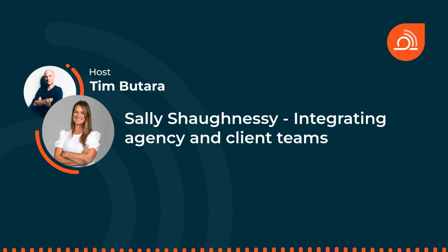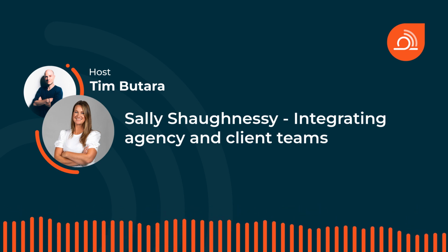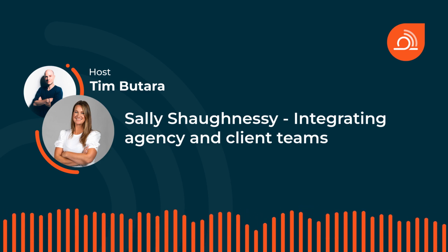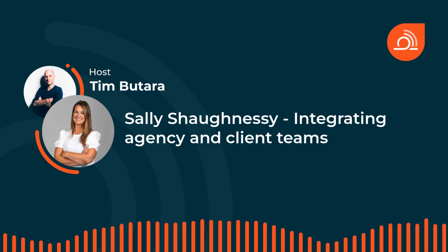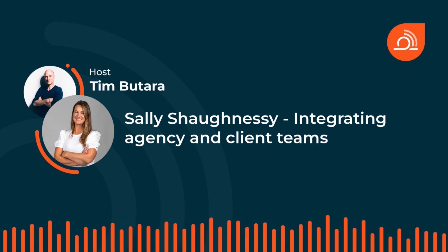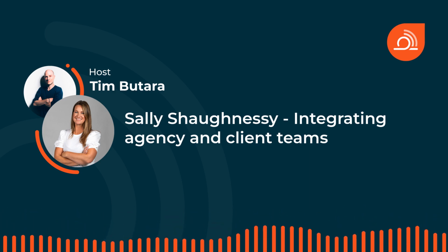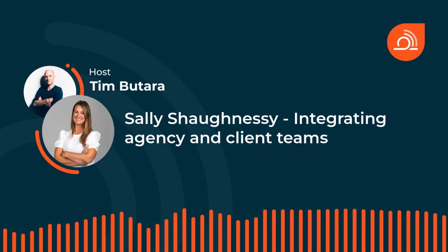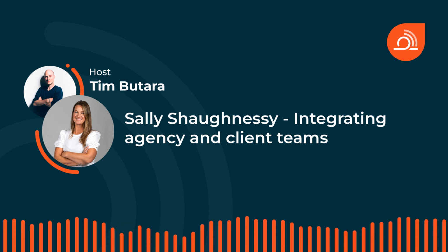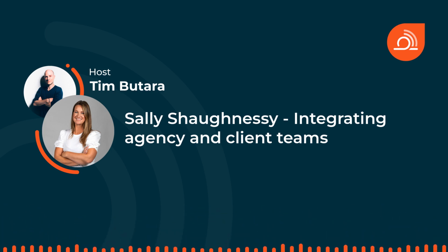Before you engage your partner, organize yourselves internally. Do you have the right steering committee or core team ready and allocated to take on this project? Sometimes the procurement team is ready to start a project, but the people that need to actually participate in the project were never made aware that this project was landing on their desk. And so that's another tip too, is that if the procurement team is not the team that will be working on the production of the project, before you engage a partner, identify who your core team is going to be and prepare those folks and schedule those folks in a way that will allow them to participate fully and give 100% to the agency partner.